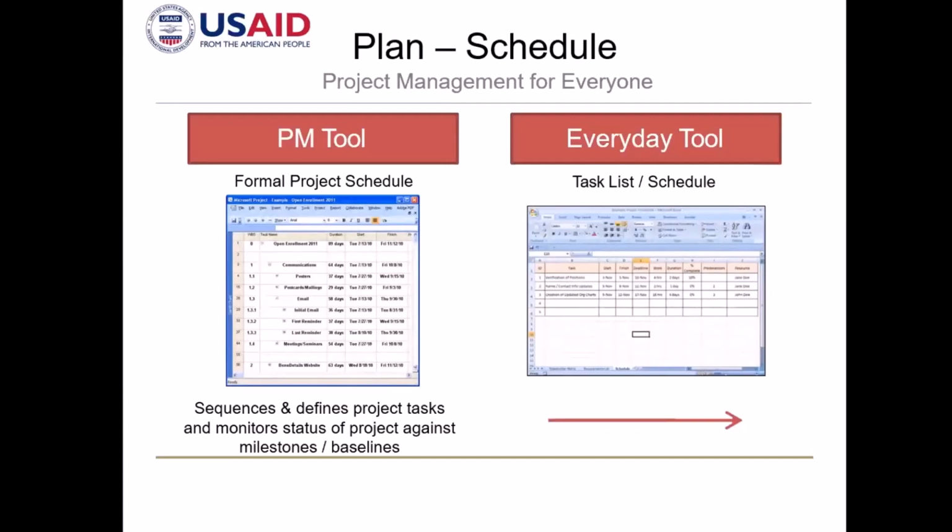But what's important is to list each major activity and divide them into tasks and subtasks, so that you can clearly define the duration of each major activity, each major task, each subtask, and when you total all of them, you will come up with your full schedule or the final project schedule that you have to put in your project plan.